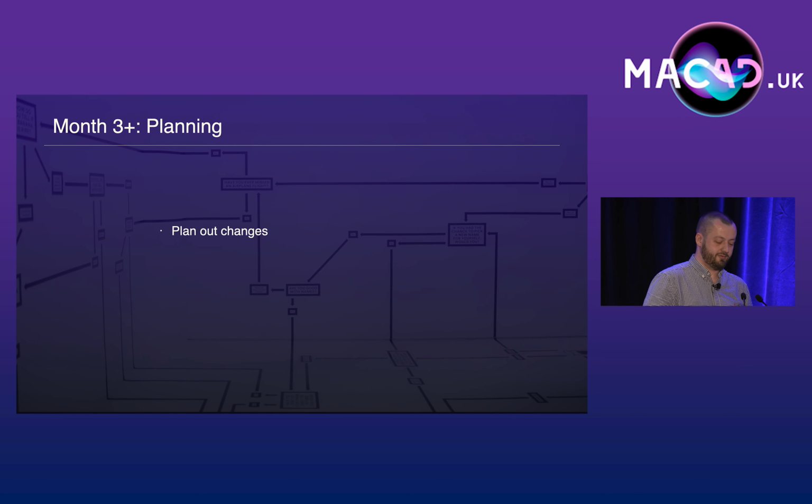Month 3 onwards, time to take your list of changes and get it documented fully. I told you I like documentation. Where relevant, group your changes together into larger projects. However, still try to keep each manageable and focused. For example, setting a naming convention across a bunch of different policies could be a single little item. But reworking the entire deployment workflow, probably better off splitting it into smaller chunks.